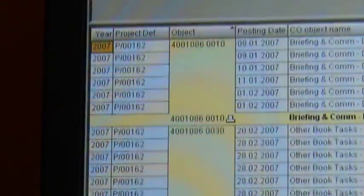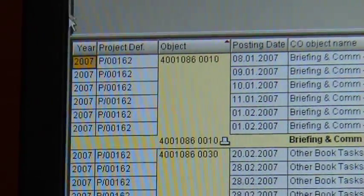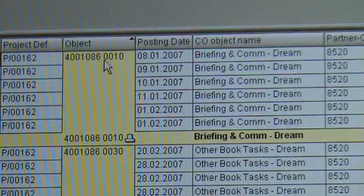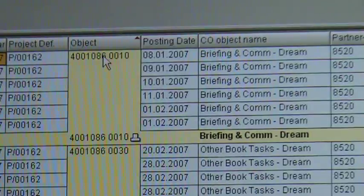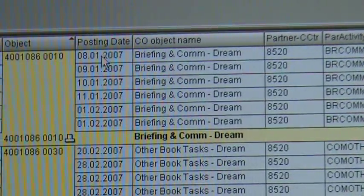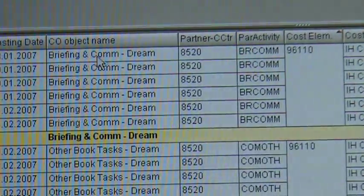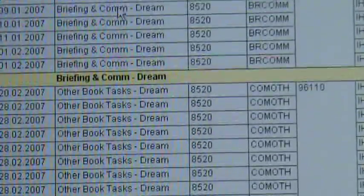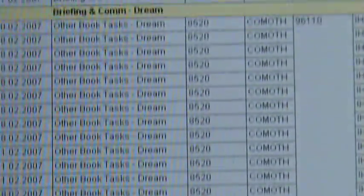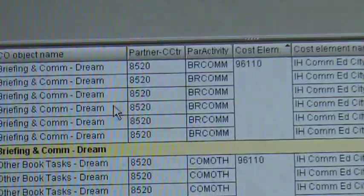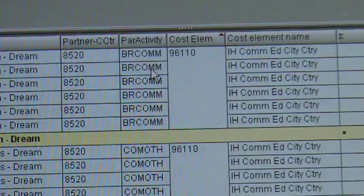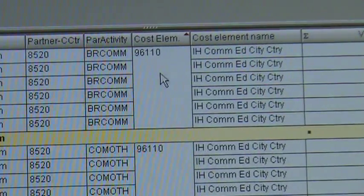In here you have the columns. You've got the posting year 2007, the project P162. The object is the activity, which was the time it was posted — don't stress too much about that, it's important to have in there. The posting date is when it took place. This is the activity — in this case it was briefing and commissioning dream, briefing and commissioning discover, etc. There are a few different activities. This is the cost center where it's coming from — don't worry too much about that. This is a cost element — it's important.